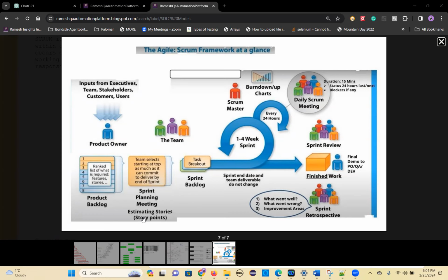Based on that idea, you will give the user story points. You analyze how complex it is immediately. Even if you are not clear, you can tell that. Later, if you give high, you need to justify why you're giving more; if you're giving less, you have to justify later: I have given fewer story points, but it is more complex, so we need to increase the story points. Then you can talk to the Scrum Master, and the Scrum Master will increase the story points later also.